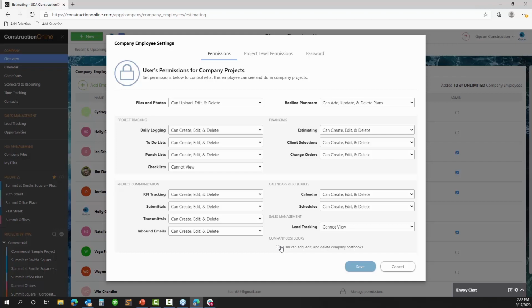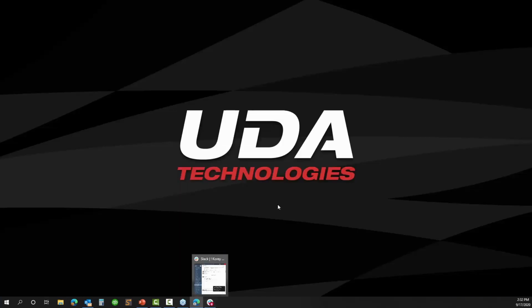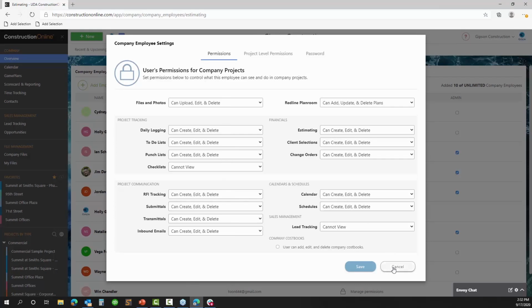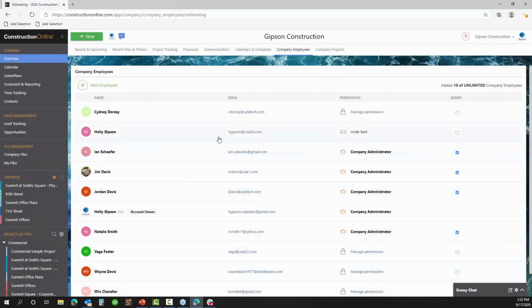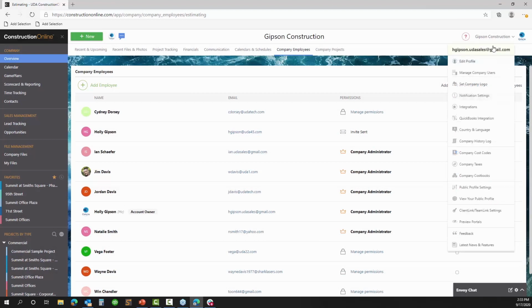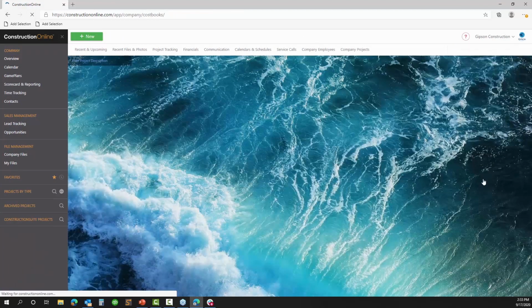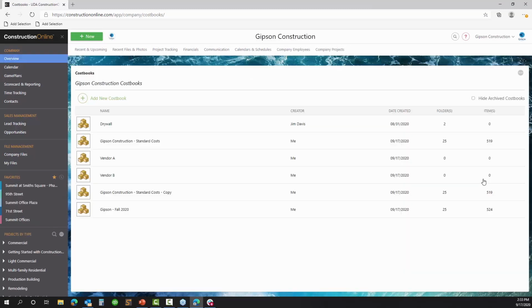Now, I see another great question coming in from someone who just wants to know, hey, what about doing cost by maybe manufacturer or specs or things like that. And I think that's really the beauty of how customizable this is and how many great import and easy options there are for building out the data. What we see a lot of customers do is actually request from their manufacturers or different vendors or lumber yards that they work with, just send me your updated price list.